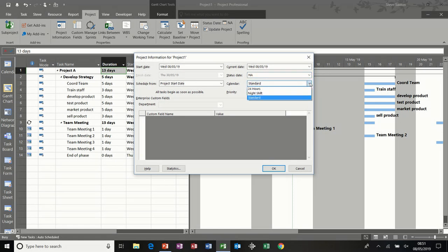Calendar options there. You've got the 3 default calendars there, and in the calendar, in the change working time box, you can actually create new calendars in addition to those 3. And then this priority box, which we'll look at in a different module, basically you can change that priority for new tasks to be whatever you want. The default is 500, but the range goes from 1 to 1,000. Basically, if you have a priority set on one of these tasks at 1,000, it's far, far more important, and it won't move, compared with something that's set at 400. When I say it won't move, I mean when you ask the computer to rationalize over allocation of resources, for example, which will come on again later on.